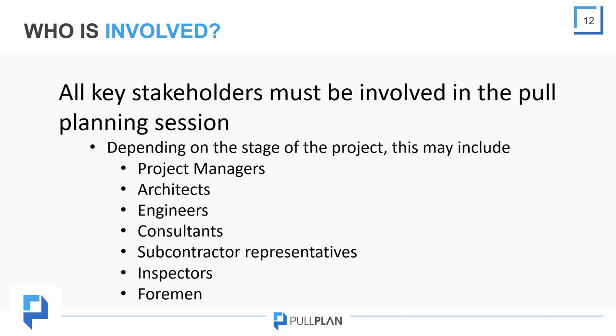When facilitating a pull planning session, some of the individuals that may be present may include project managers, architects, engineers, consultants, subcontractor representatives, inspectors, and foremen. It's also a really good practice to appoint a facilitator for the session. This individual keeps conversations moving and planning progressing, and also ensures that teams don't stall on complex technical issues.